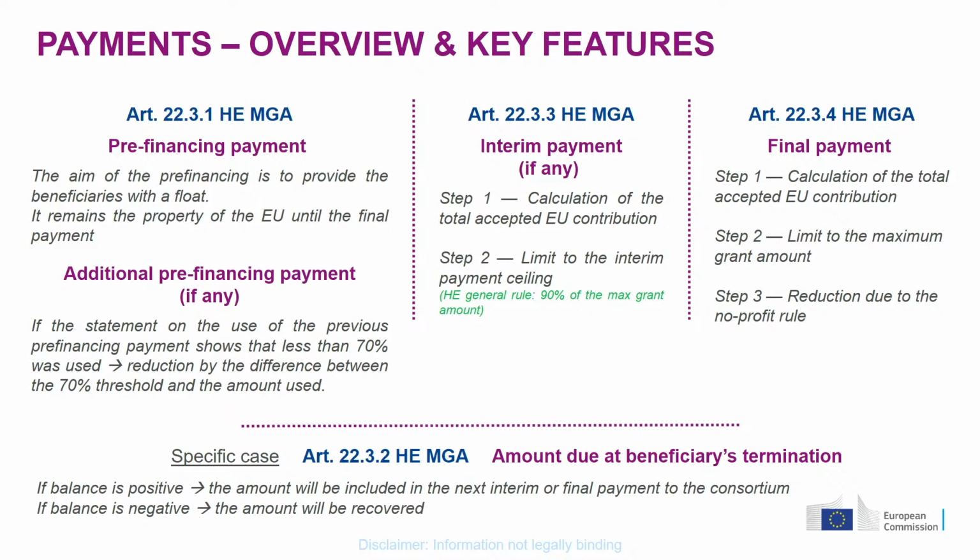And we will also apply, if it is needed, a reduction due to what we call the no profit rule. So the no profit rule will come into play at final payment stage, and we will calculate the final amount due, and we will calculate a balance.